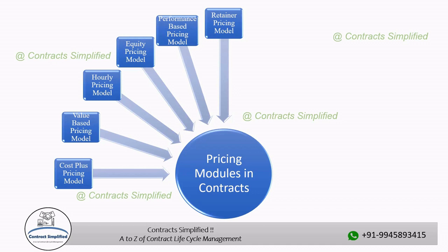It's important to define the scope of services and deliverables clearly in the retainer agreement to avoid any misunderstanding or scope creep. The retainer agreement should outline terms for terminating the agreement and any provisions for adjusting the retainer fee or scope of services over time. Depending on the retainer model, there might be a limit on the number of hours or services included in the retainer. Additional work beyond the retainer might be billed separately.